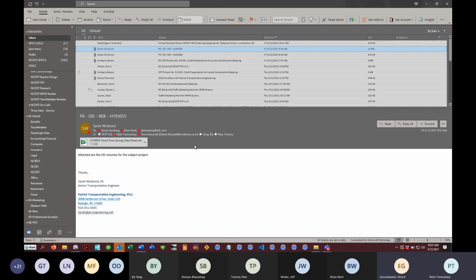All right. So I guess we got bad news on the front end and bad news on the back end. It's going to take us a little while to get up and running. So the idea of having your first model due the 19th is probably not going to happen. We're going to probably push that out to the 26th, where we're getting our first ones in. That's the bad news on the front end as far as schedule. And the bad news on the back end is we requested August 15th as a delivery date, and we were told that was not acceptable.